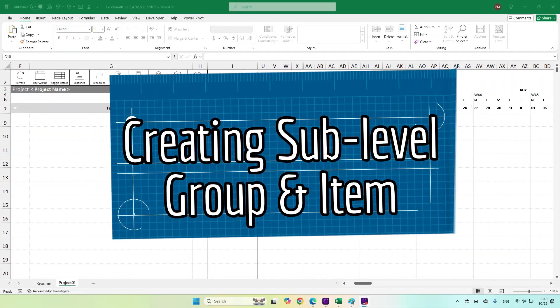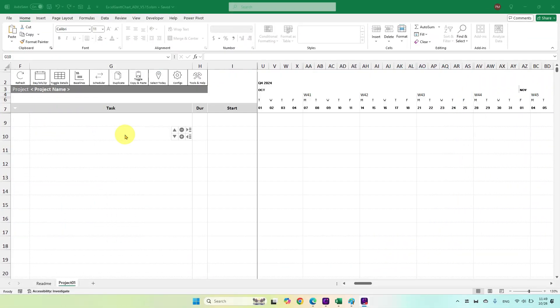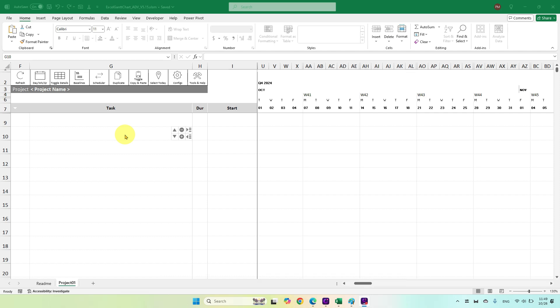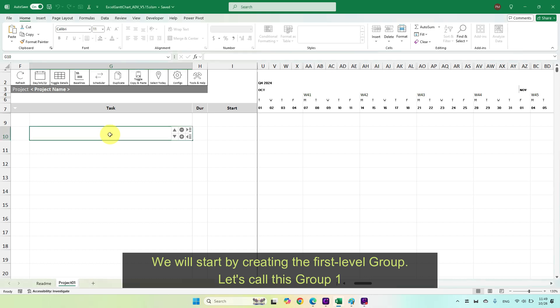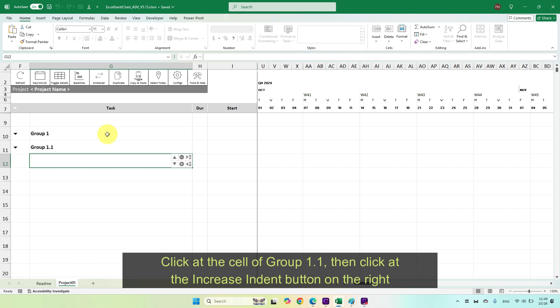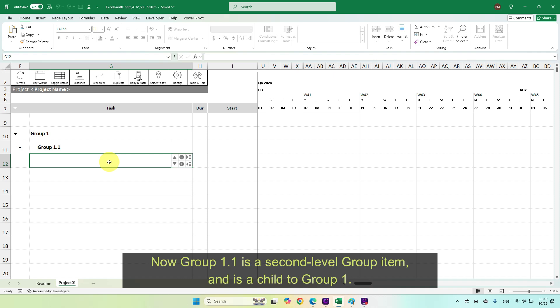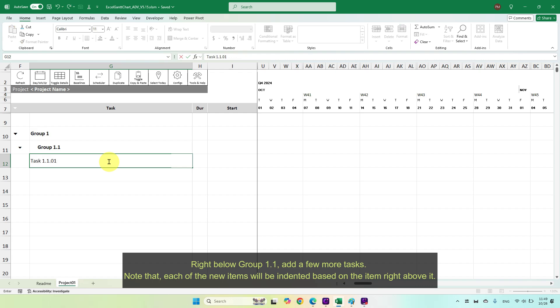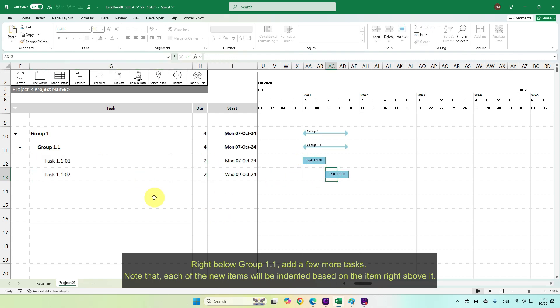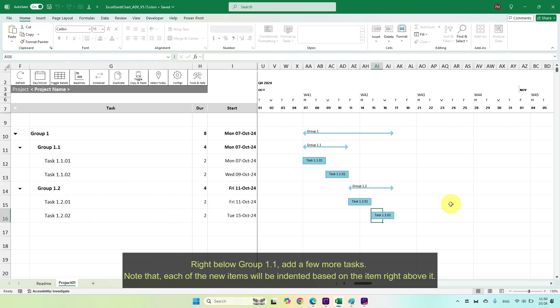Creating sub-level group and item. To create subgroup and subgroup child items, indent the group to the target level and then create its children. We will start by creating the first level group. Let's call this group 1. Right below group 1, create group 1.1, which will be our second level group. Click the cell of group 1.1, then click the increase indent button on the right. Now group 1.1 is a second level group item and is a child to group 1. Right below group 1.1, add a few more tasks. Note that each of the new items will be indented based on the item right above it.